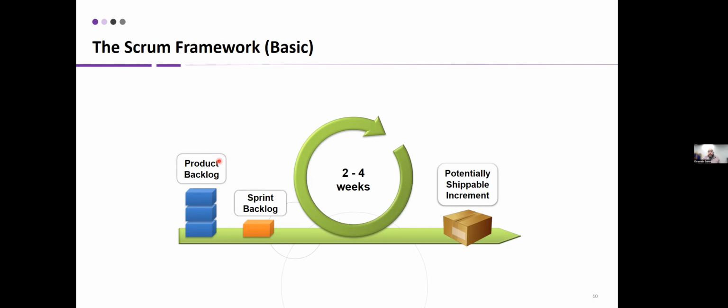Okay. And then we're going to take a sliver of this, a portion of this backlog, and we're going to hammer it with the client. This is where we do all of our analysis. We're going to go deep. We're going to go to the design of things. We're going to go to the technical background of all of it, how it's going to be done, right? But this is something very small. It's maybe 2 to 4 weeks. And then we actually go ahead and work on it and implement it.